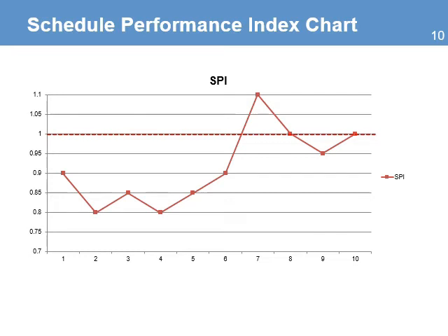The Schedule Performance Index is a measure that can be taken at various intervals during the life of the project. Here you see a chart with various points that show the SPI values of the project from the previous example taken every month. Any value below 1 means the project is behind the schedule. Values above 1 means the project is ahead of the schedule. In this example, we can see that the SPI values have changed over the life of the project. This is a chart the project manager can use to track progress of the schedule performance over time, especially to track the results of changes and modifications to help the project recover any lost time.